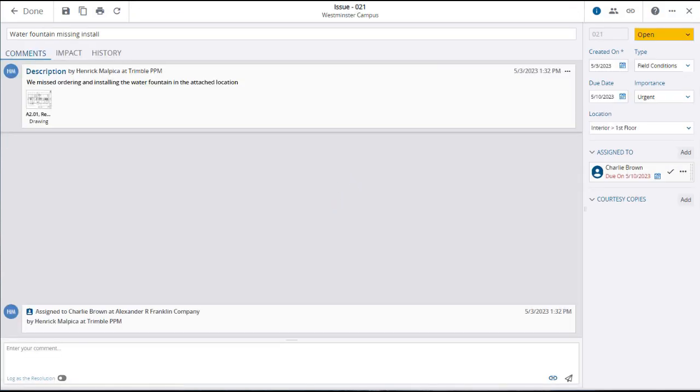Note that public annotations linked to records can be seen by all but the linked record can only be seen by those who have the permissions to view that record. For example, there is a box that is linked to an RFI. Everyone can see the box, this is a public annotation by default. However, only those who have access to the RFI record can see the link and reference to the RFI.